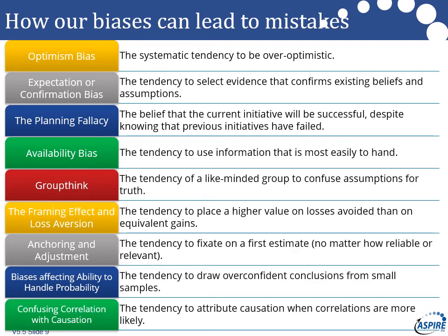So, there's been plenty of research around, certainly in the UK, about the problem with optimism bias. When you really want something and you're looking at the business case, you don't see the faults in the argument. You all want it to happen, so you don't look on the dark side, and you therefore have a natural bias in every estimate.